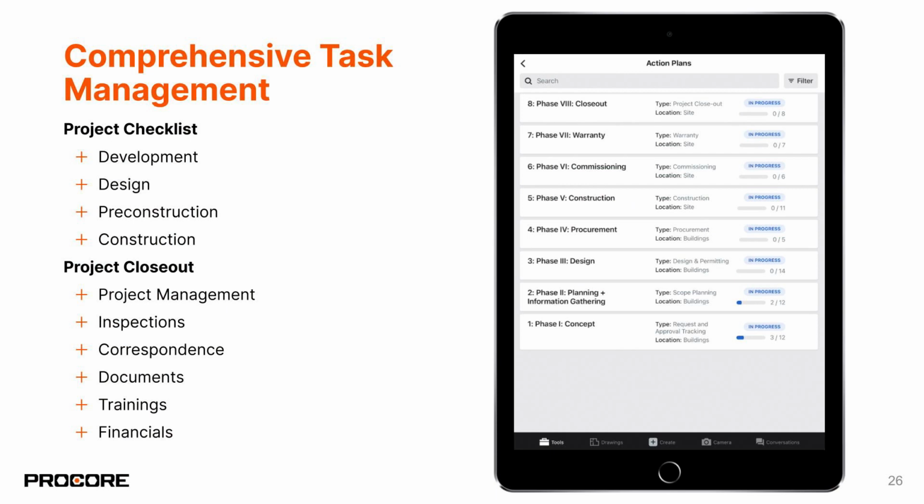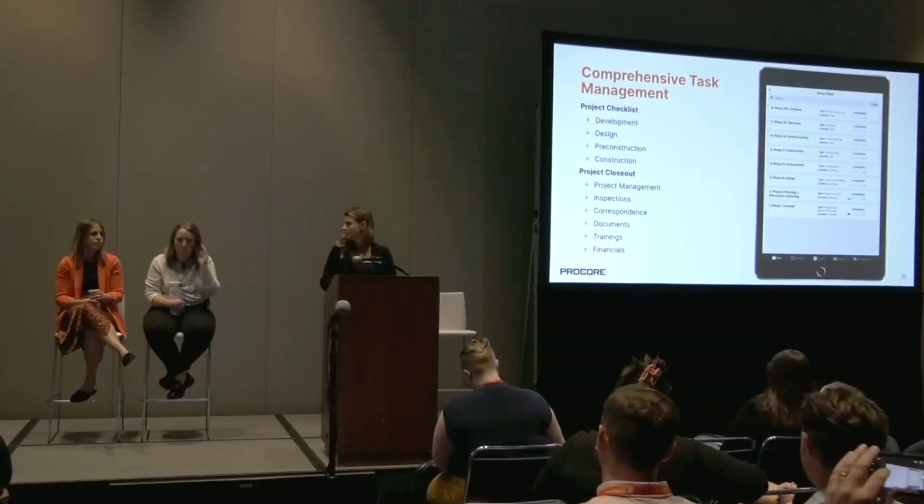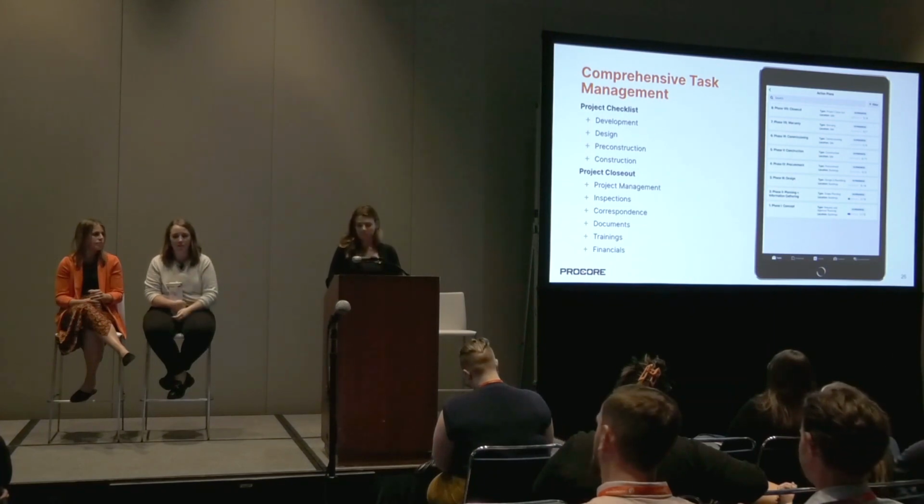Project closeout is the most recent list or template that we've applied to our projects. It kind of asks things like, hey, are you billed 100% on all of your commitments? If you're not, do we need to do a deductive change order? And it also makes sure to get things like O&Ms and make sure we have our facilities manuals, all of that. And it just keeps that reminder so we remember what we need for all of our projects.